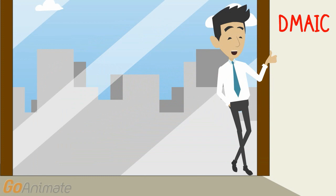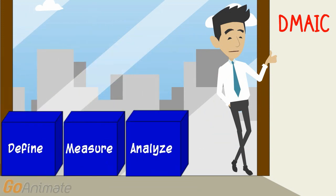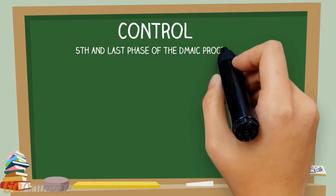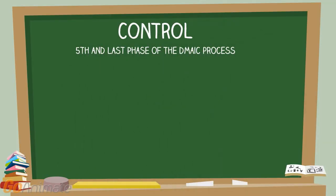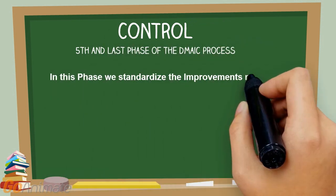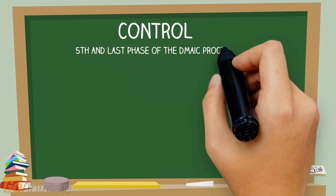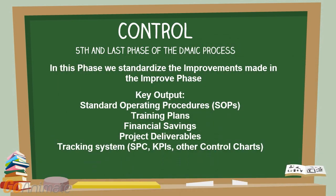DMAIC stands for Define, Measure, Analyze, Improve, and Control. Control is the fifth and last phase of the DMAIC process. In this phase we standardize the improvements made during the improve phase — key outputs include standard operating procedures, training plans, financial savings, project deliverables, and tracking systems such as SPC or KPIs to verify improvements made are sustained. The control phase is approximately two to three weeks in total duration.